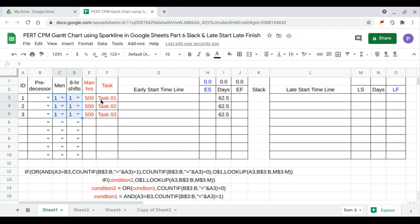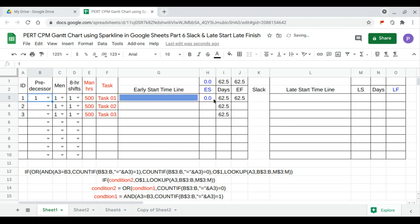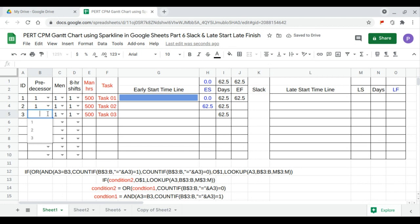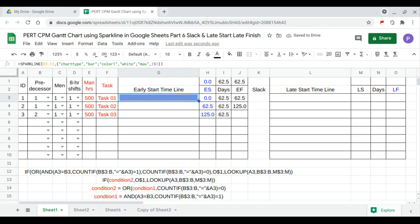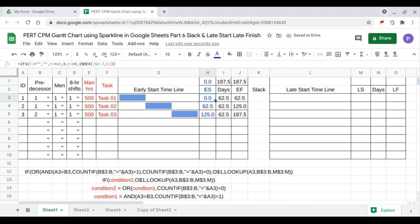Let's say task one has no predecessor — it precedes itself, so the predecessor is zero. Task two follows task one, task three follows task two. We drag the formulas downwards to refresh.